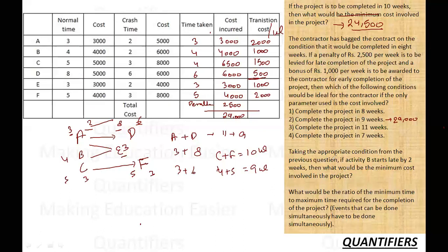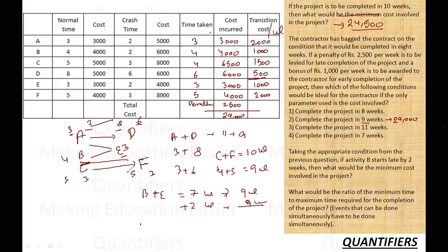Question 3: Taking the 9-week condition from the previous question, if activity B starts late by 2 weeks, what is the minimum cost? B starting late means B and E both shift 2 weeks forward, but since only E depends on B, no other activity is affected. B and E will still complete within the 9-week window. So the cost remains the same: 29,000 rupees.